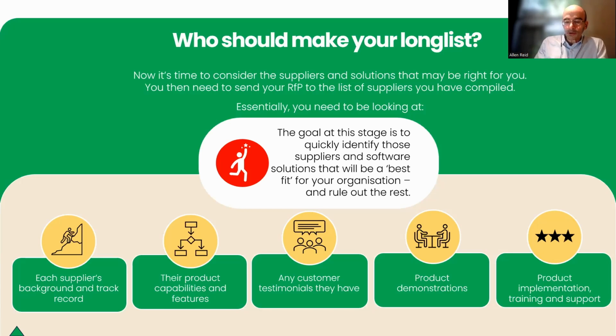My own experience is that one of the most important resources to manage as part of your supplier selection process is the energy and the time of your evaluation team, your own organization. And what I've found is that if you are inviting 10 or more organizations to bid, your team just get exhausted before you even started. Before you get down to the last 2 or 3 that you're considering, you've already spent far too long and they've had far too many meetings and they're sick of it and they're just desperate to throw a dart at the list and pick one, for goodness sake. So can I just get your thoughts on that? Have you found people including too many vendors, or do you think a lot of vendors is a good idea?